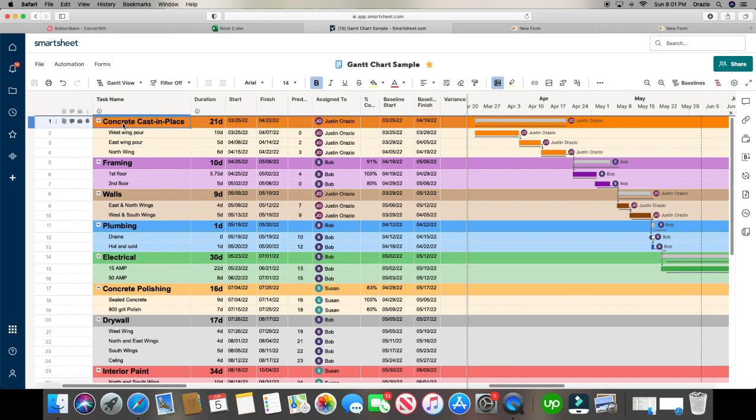And the parent row here, the dark orange, is every one of these tasks summed up. So you got 10 days, 5 days, 6 days, a total of 21 days. And Smartsheet has it set up where it automatically tallies this. So if I change this to 11 days, this will change to 22. See? And then it automatically adjusts over here as well. And as things progress or get completed, this bar will slowly fill up. And you have your baseline. Again, if you don't know what baselines are, I have a video on that I can also drop in the link below. And it's pretty self-explanatory.